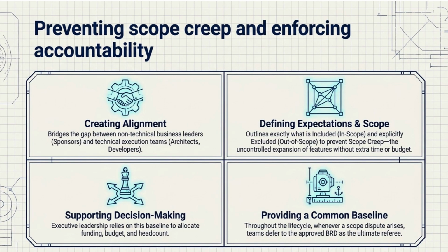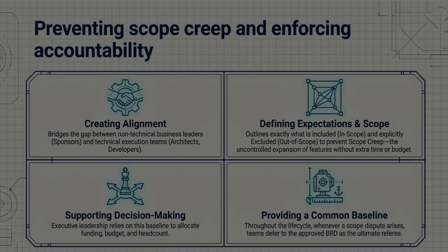Far from being paperwork, the BRD acts as the ultimate referee across the project lifecycle. It aligns executives with technical architects, defines in-scope and out-of-scope boundaries to prevent scope creep, provides leadership with a baseline to commit funding, and serves as the single source of truth during scope disputes.